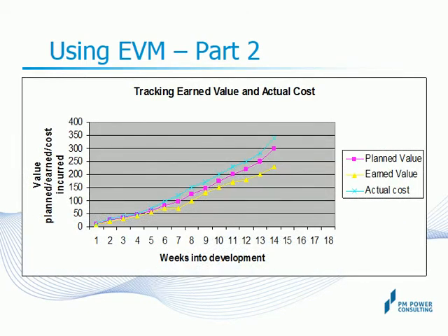Here is a sample analysis of the project situation in the diagram that we saw in the earlier slide. You can see that till about week 5, things were progressing reasonably well. During week 6, earned value begins to flatten and stays flat for about a week, while the actual cost continues to grow as before. In week 7, earned value picks up and starts growing again, but continues to lag behind planned value and actual cost. What do you think has happened to cause this in this project?